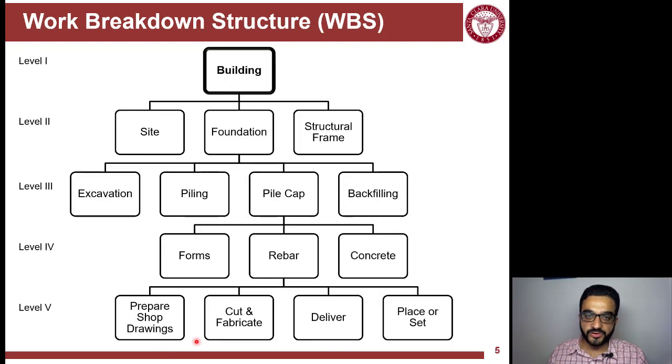And then I can break this further through different levels until I reach a level where I feel these are the activities, and breaking it further is not returning any more benefit. It's actually harming me, because it's now more activities to manage and include in the project plan.